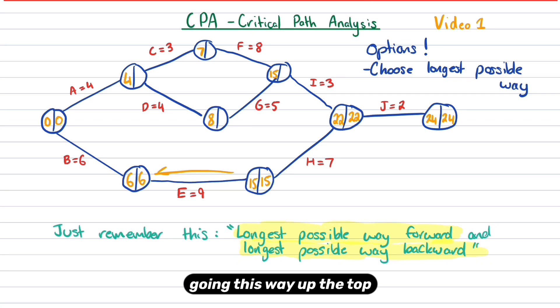Now going this way up the top, we've only got one option, right? So 22 take away three is 19. And then once again, we've only got one option going backwards this way. So 19 take away five is 14. Then we've only got one option going back. So 19 take away eight is 11.